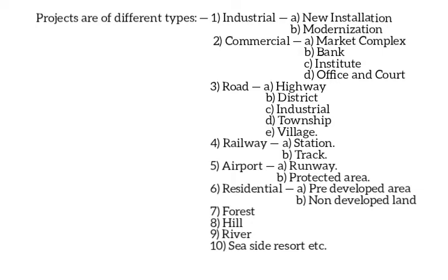As in an industrial project, different supply lines and obstacles come out in the construction area. Safety precautions should be at a very high level. Old foundations and machineries may have to be dismantled. Scraps and waste are more in industrial areas, whereas in an open area project, development of land, arrangement of sources like water, electricity, etc., and managing the locality are more important.